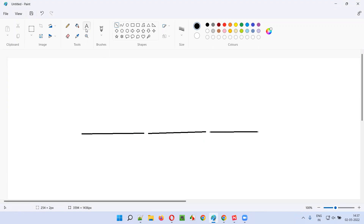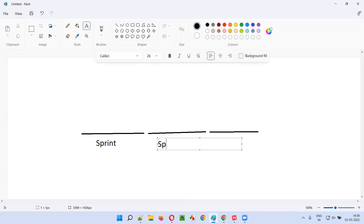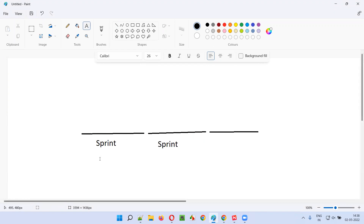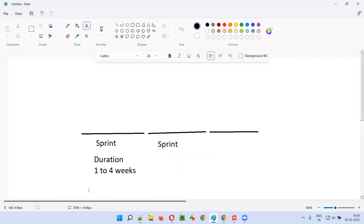Each and every iteration is known as a sprint. This sprint has a time-boxed duration — that is one to four weeks, depending on the project. Some projects will have one week as a sprint duration, while other projects have two weeks, three weeks, or four weeks as a duration.